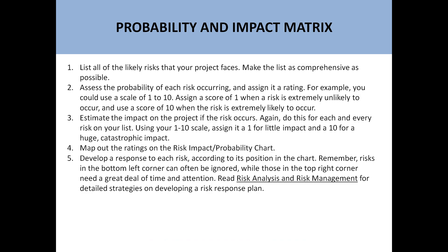The process is: first of all, we have to identify all the risks. Risk is the uncertain condition of a project. Then assess the probability of each risk occurring and assign it a rating. For example, you could use a scale of 1 to 10 — assign a score of 1 when a risk is extremely unlikely to occur, and a score of 10 when the risk is extremely likely to occur.